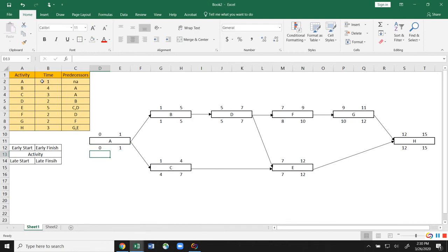All right, so this takes a second to think about, but what have we done here? Remember, we have the early start, the early finish, the late start, and the late finish. So that's when these things need to happen in order to get this project done in 15 weeks. And so what you're noticing now is that some of our activities have the same earliest start and the latest start, as well as the earliest finish and the latest finish.